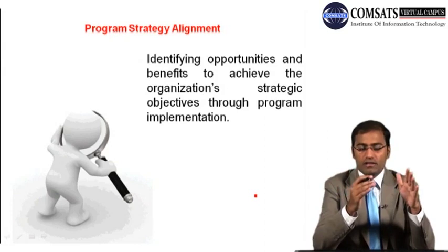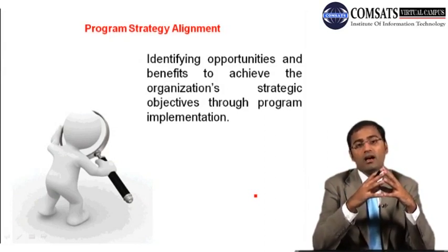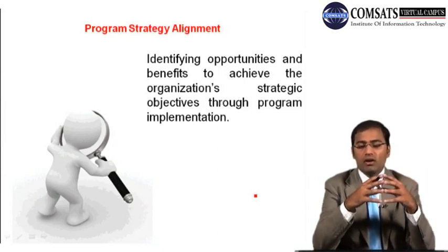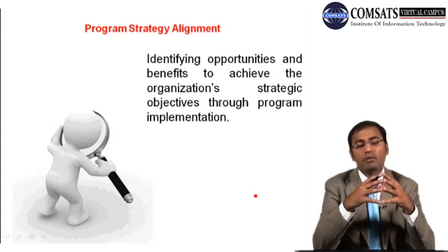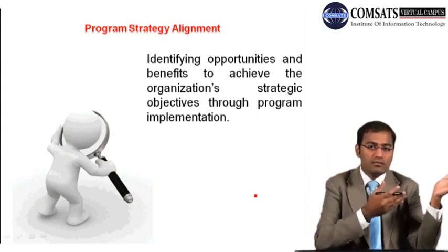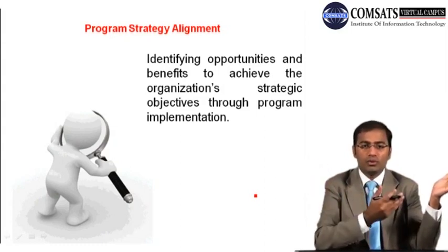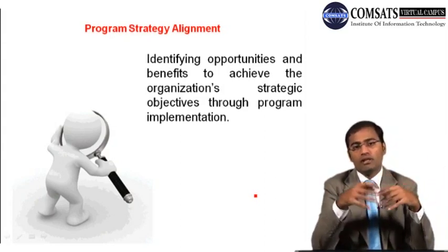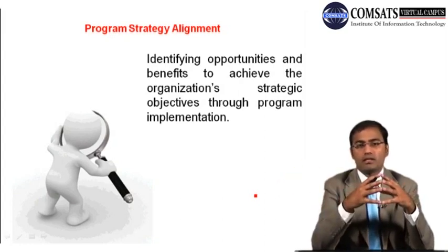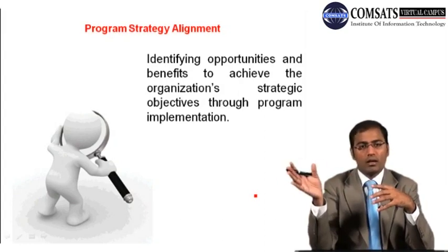They will have those strategies with them, and then they need to identify the opportunities and benefits: what opportunities they want to exploit, what benefits they want to achieve, and the organization's strategic objectives through program implementation. So this is our objective, and how do we get to it? What are the right means to go to that place? If some project is not following that path, the program manager recommends the premature closure of that project.